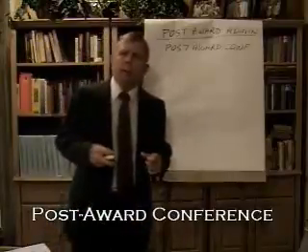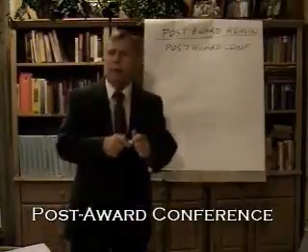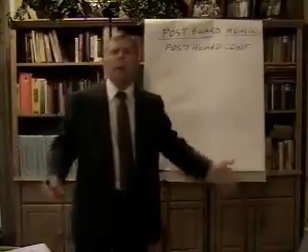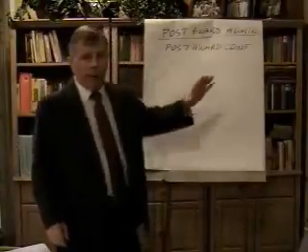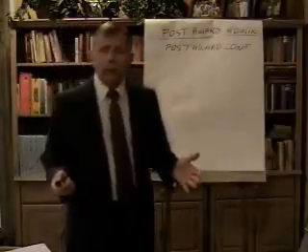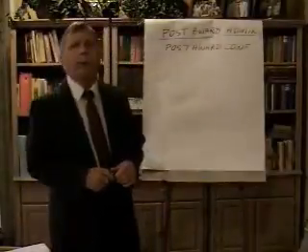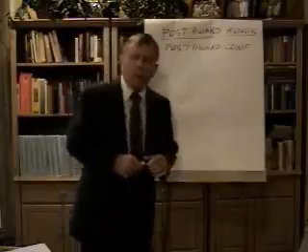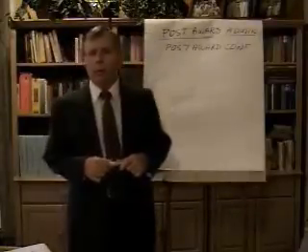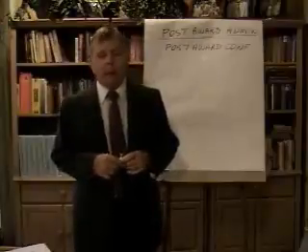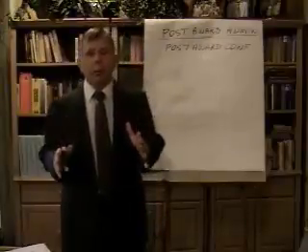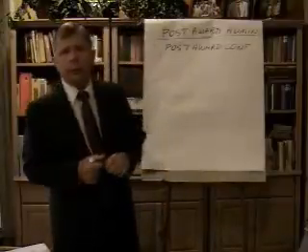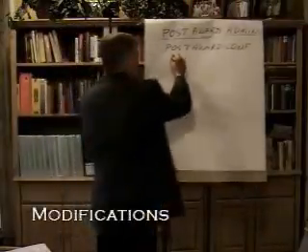It could be just by telephone to identify with the contractor so that we both know when the work's going to be done, how the work's going to be done. But as in larger dollar contracts, it may need to be more of a formalized conference. As part of the post-award, there's going to be possibly changes to the contract over its lifetime. And we do this through modifications.